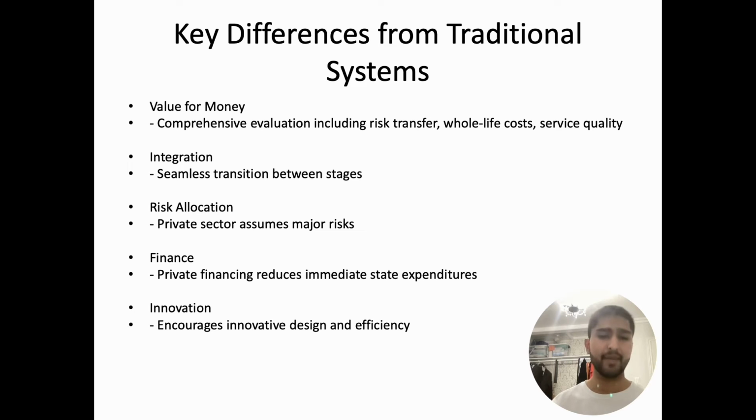And now talking about the maintenance, the long-term obligations. P3 contracts often include long-term maintenance, ensuring infrastructure remains in optimal condition. In the traditional method, this often lacks such safeguards, leading to higher life cycle cost.